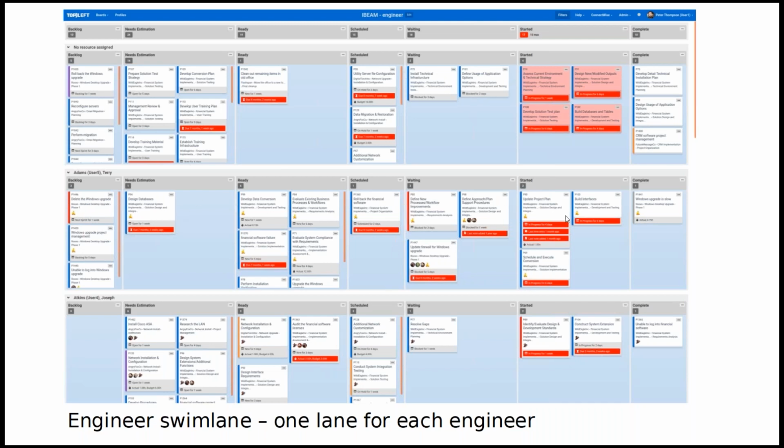So you can see who's a bottleneck. These folks have 3 things started, 2 things started. That's not too bad, but you might find that one of your engineers has 10 things started, and you can see that's definitely a problem. We need to ease up, and we know that the work that's waiting on the person who has 10 tickets in progress is going to be delayed. That's going to be a bottleneck. We need to address that.